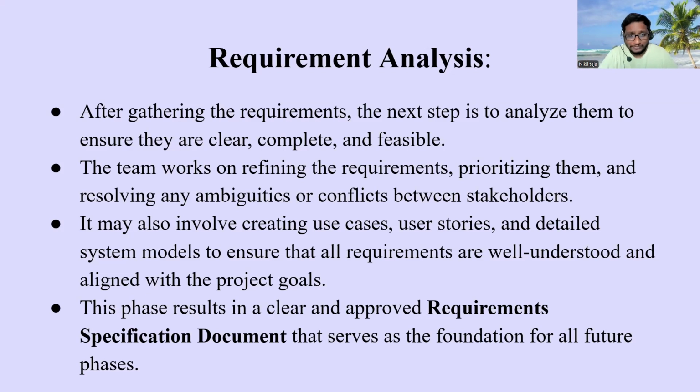So the team will be working on refining the requirements. As I said before, they'll be cutting off some unwanted requirements, prioritizing the requirements, and resolving any ambiguity or conflicts between the stakeholders. So this is the second point. The third point is that it may also involve creating use cases, user stories, and detailed system models to ensure that all requirements are well understood and aligned with the project goals.